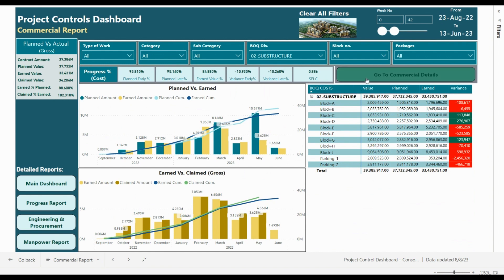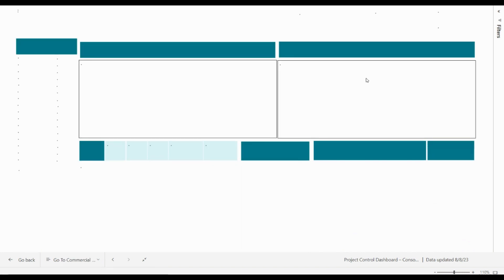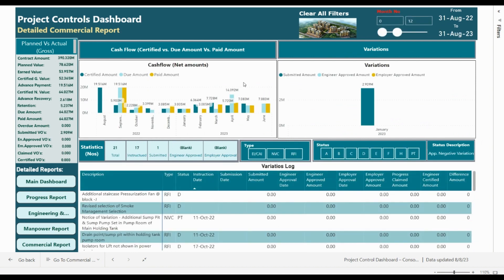We can go into further detail in the commercial report. The previous section explained planned and earned — now what about the claimed amount? After the claim there will be a certification process. Here we present the certified amount, due amount, and the retained amount, as well as the variation analysis. Currently we have 2.9 million submitted in total variations with nothing approved by the employer or the engineer.